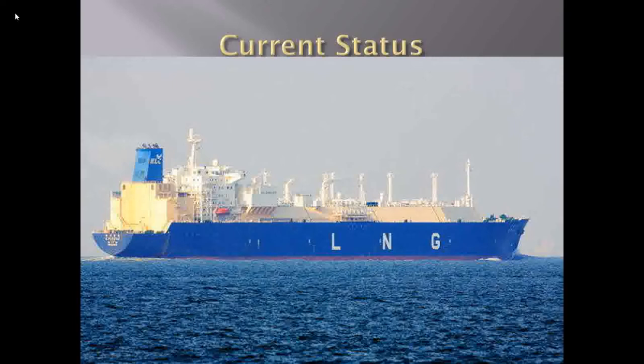One important activity in pre-FEED is to map the soil characteristics at the site. This is necessary for selecting construction methods and materials to be used for construction of an LNG plant. This work is essential to guarantee that there is sufficient technical definition and preparation for the construction phase, for it to be completed efficiently within the schedule and cost estimation. Environmental and geotechnical surveys on the site in Lindi will be required before initiating any project activities.